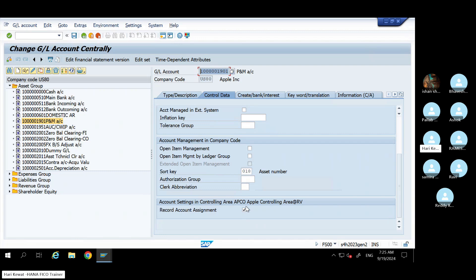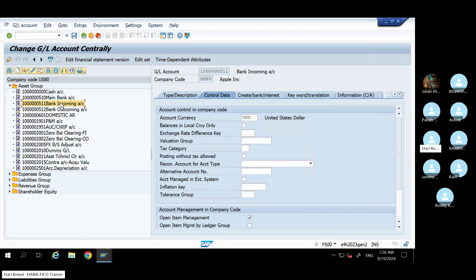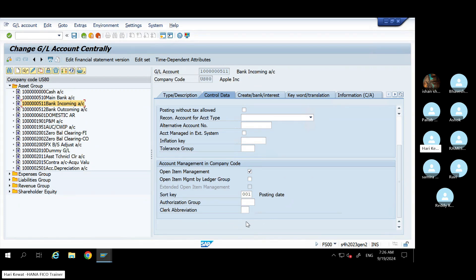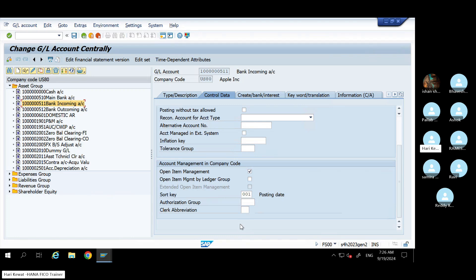This option will not come for all GLs — this is very critical. For example, if you go to a bank GL, the 'Record Account Assignment' option will not appear. How does the system recognize which GL should show it? Once you assign the GL in AO90, the system understands it is an asset-related GL and the option will appear. Or once you assign any inventory GL in OBYC, the system understands it is an inventory GL and will automatically enable the option.